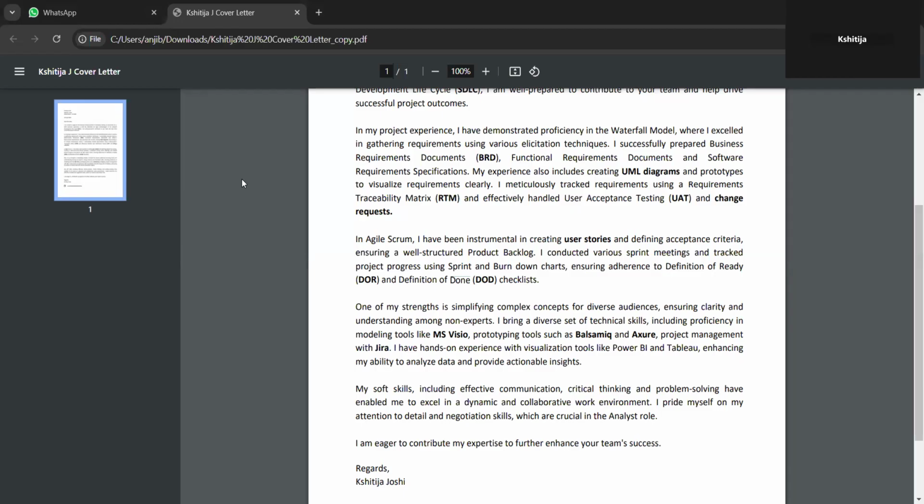First, I developed a detailed UAT plan with the stakeholders, and after that conducted the UAT sessions with the end users and client testers. If they raised any defects or issues during the UAT, then there would be bug fixing.